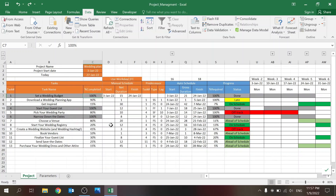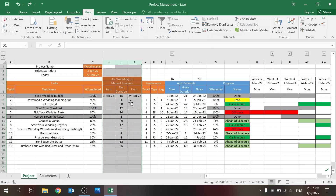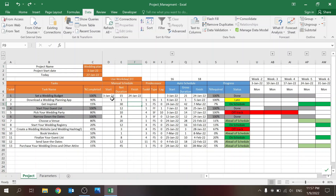I make sure it's a decimal between zero and one, since I don't want to allow negative completion or above one. Then you have the option for a manual schedule for the start and finish date. Obviously the first task has to have a value even if you have dependencies, which I'll show you in a minute.